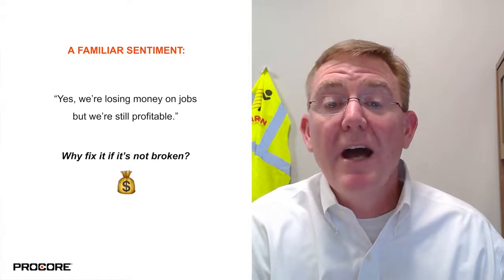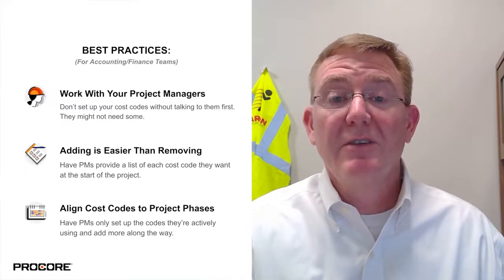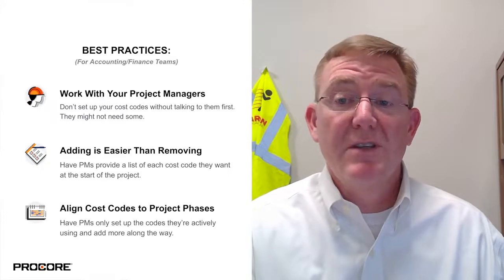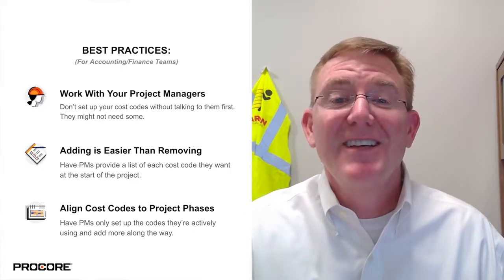And with that, I'll end with some best practices. First, don't set up your cost codes without talking to your PMs first. If you have cost codes they don't need, it can cause issues with miscoding. Miscoding can lead to bad data, and bad data is worse than no data at all.